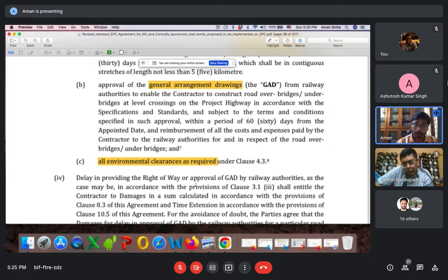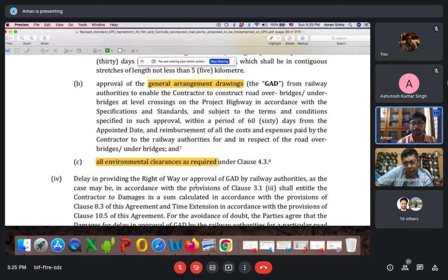So there are two conditions. The contractor will be providing a mobilization guarantee in terms of a bank guarantee. And based upon that, some percentage of amount will be given to the contractor by the authority. So then after 30 days, or after you attain a particular milestone, the performance security, or advanced performance security, will be given by the contractor to the authority. And then again this will go on: after you complete a particular stretch, a particular milestone is achieved, the authority will also pay you.